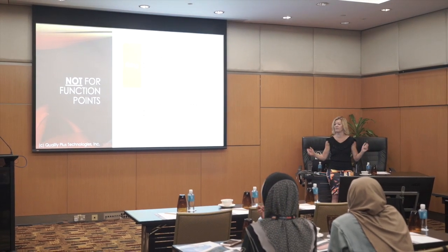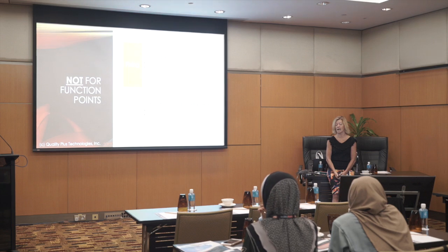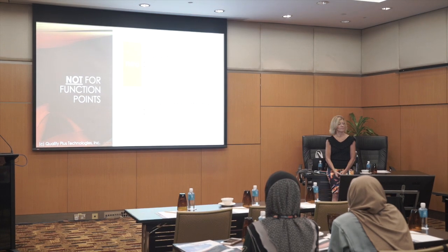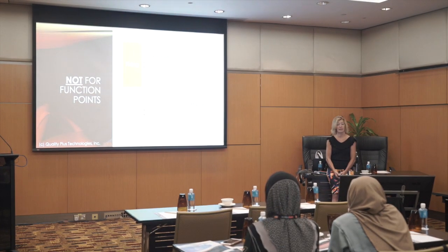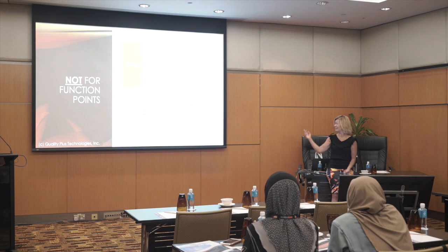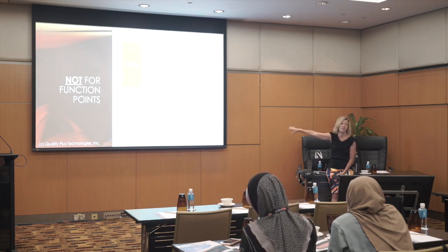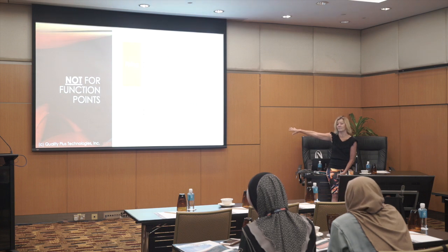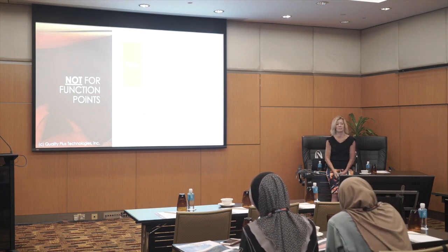If I tell you I want to have a very nice yard in front of my house, how much will it cost you to bring in 50 trees? I'll give you square feet. Will that help you? Square feet has nothing to do with trees. Function points has nothing to do with maintenance. That's effort, but it's not based on function points. Performance tuning, configuring tables, doing data population. Those are not building. Function points are only for construction and renovation of software. That's it.